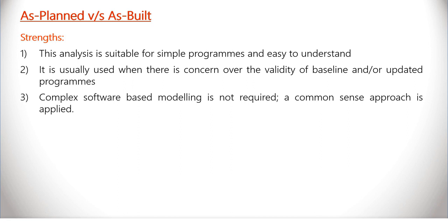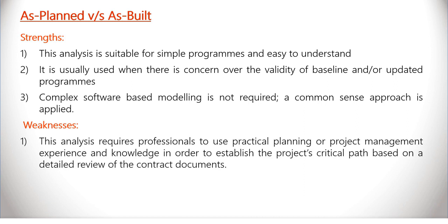Weaknesses. This analysis requires professionals to use practical planning or project management experience and knowledge in order to establish the project's critical path based on a detailed review of the contract documents. However, different experts may reach different conclusions, and this could result in a lot of debates.